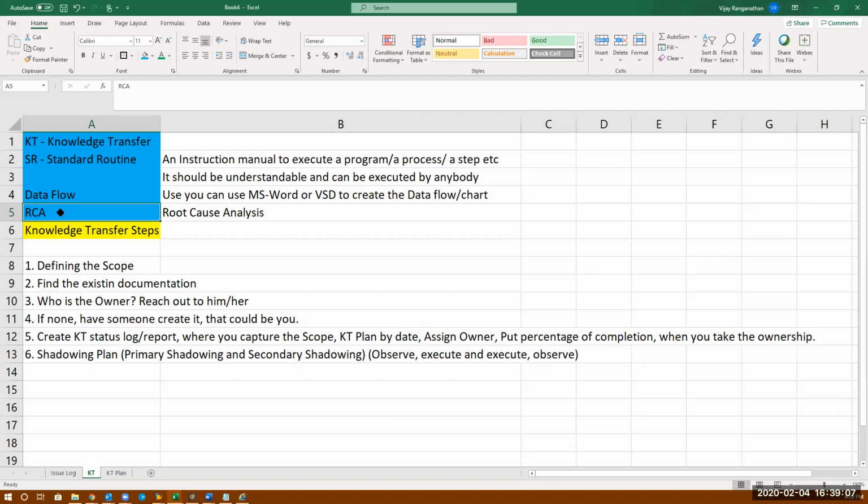job failed, a bank statement failed, you can fix it and you move on. But how do you prevent this from happening in the future, right? If you do not know why something happens, it will happen again. So you have to find the root cause, right? And then document this so that you can mitigate this. You can prevent this from happening. That's called RCA, root cause analysis.